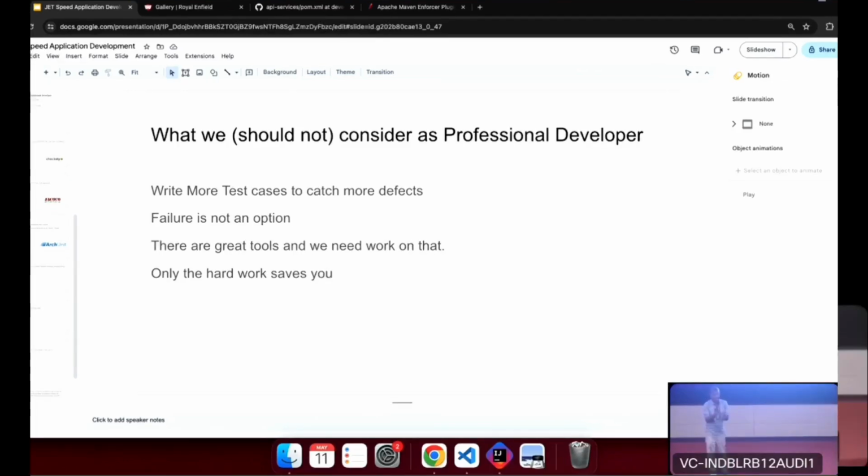The advisory is to have a pizza-size team, that is an 8-member team. But you cannot go with that hard and fast rule, particularly for an R&D kind of team; that will not work out. Ideal size, you keep it as any team that can complete the stand-up within 10 minutes. Even if they are bigger, if they are completing within 10 minutes, go with the team. If they are not, even a small team is a difficulty. So it comes by experience only. It depends on the team's culture, how much time they spend.